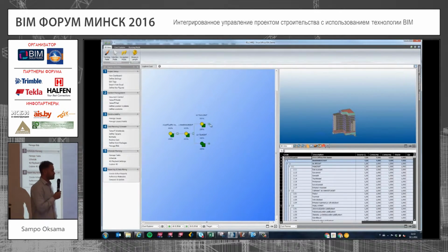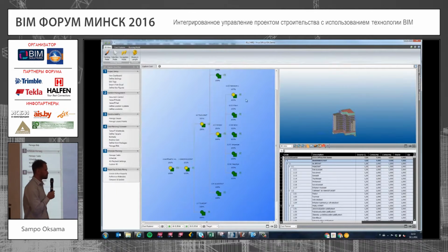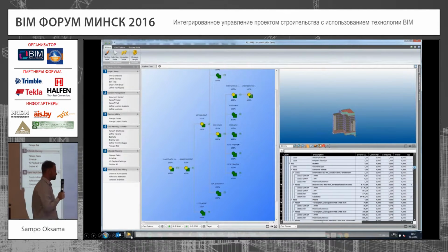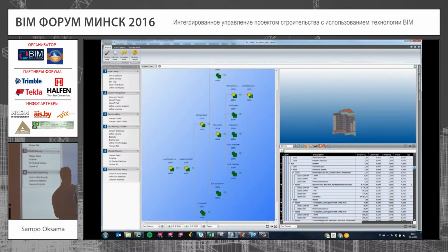And of course, what about changes or different versions? That's probably the most important thing. Here's a handy tool for visualization of the different versions. Let's think that we have the same inner walls and the reinforcing bar price is going up. So we have a new price for the rebars, and then we can compare two different prices here. With this traffic light system, we can easily see that, okay, the other one is 7% higher in price than the other one.